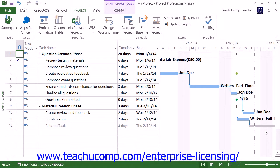One of the many benefits of project management is the ability to perform earned value analysis, also often referred to as earned value management. This type of analysis allows you to view project statistics that reveal the overall health of the project in terms of time and cost, while assisting you in revealing trends that can be indicative of the eventual success or failure of the project. When you view information from earned value analysis within your project file, you compare figures at a specified date against figures from one of the saved baselines.